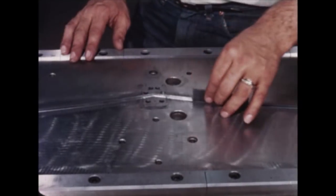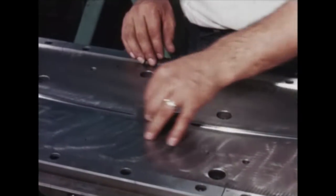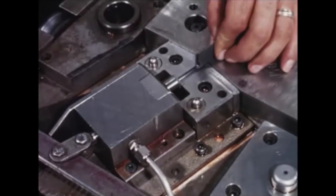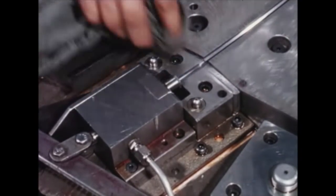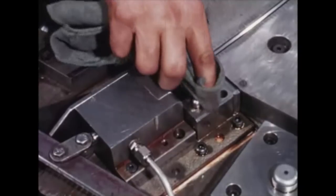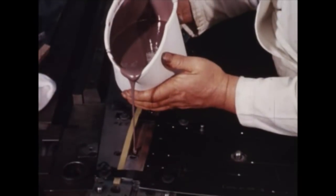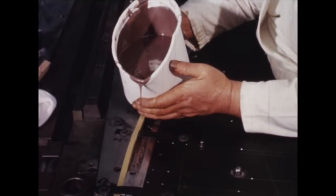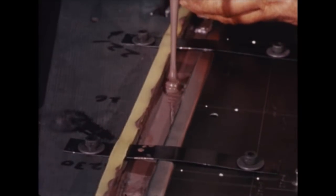The program to evaluate an experimental thick-walled tube forming process continued during this quarter. In the conventional method, the die in which tubes are formed is machined from a steel plate. This method ensures a high degree of integrity, but requires a long lead time in fabrication before a new tube design can be evaluated. In the new process, a moderately wide trench is formed through rough machining of the metal plate. The contour is approximately that of the desired configuration, which in this case is an experimental thick-wall round tube.